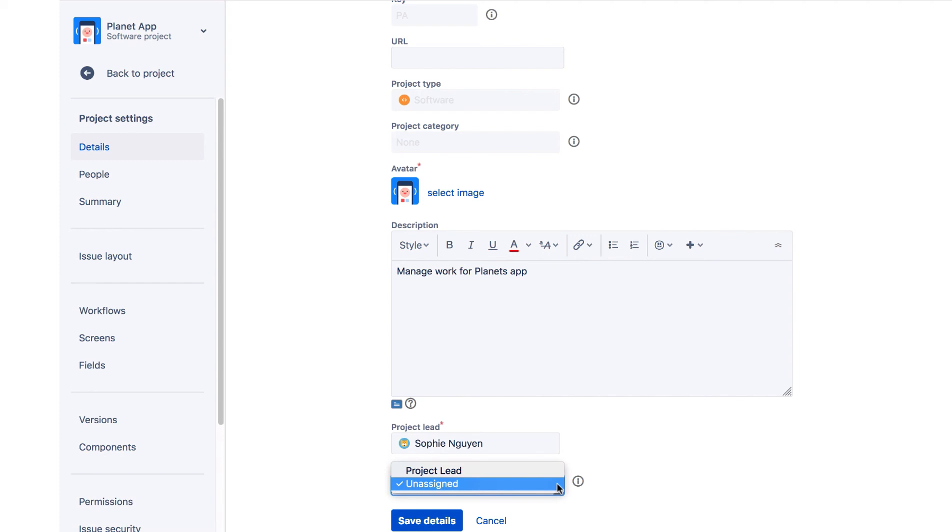Additionally, settings in the Components section of the project's configuration may override the default assignee for any issues that have the component fields set.